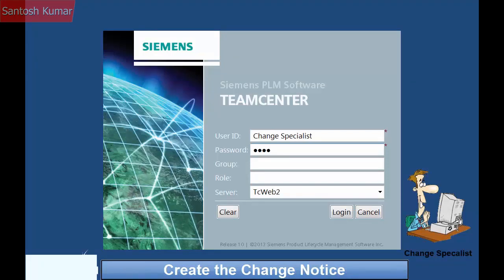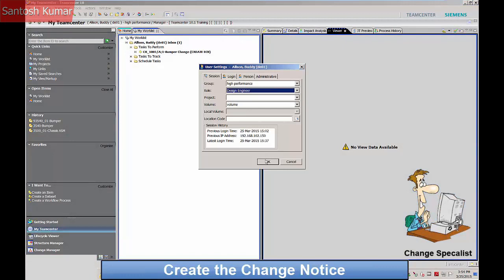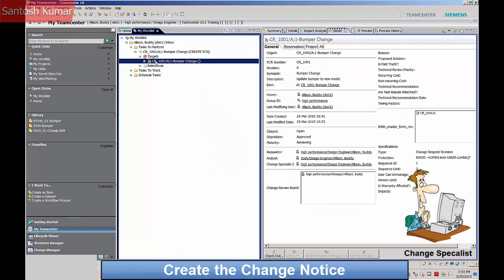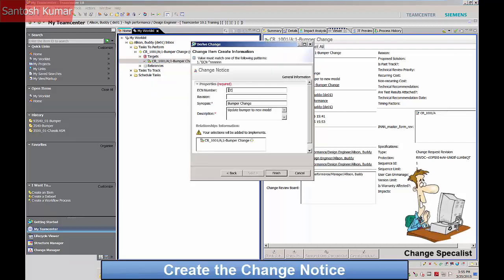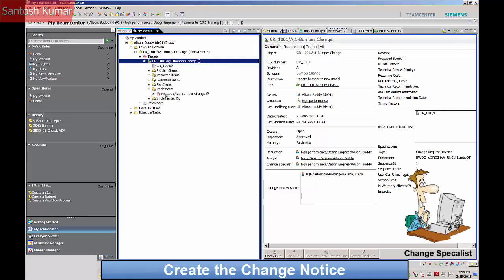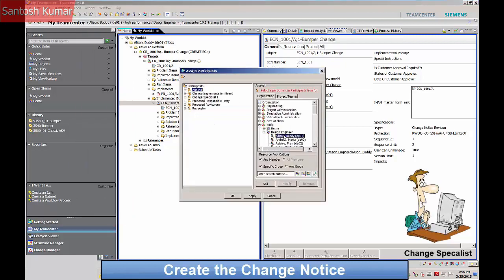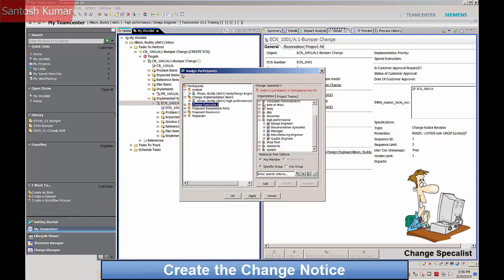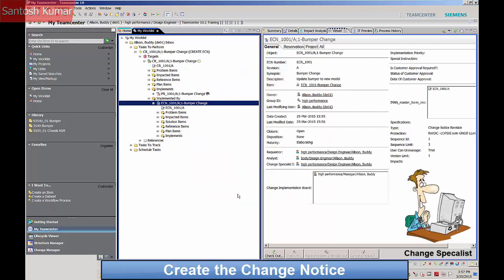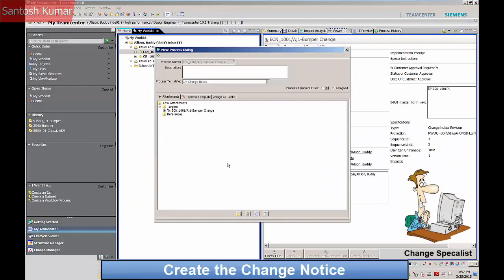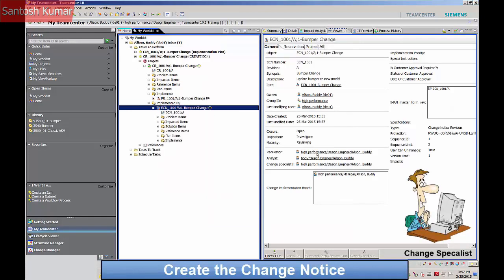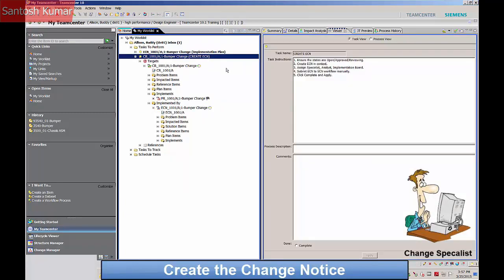The task to create the change notice appears in the change specialist's work list. The change notice is derived from the change request, and information from the change request is propagated into the change notice. The change request is shown as implementing the problem report and being implemented by the change notice. The change specialist now assigns participants to implement the change notice. The change notice task is now completed and signed off.